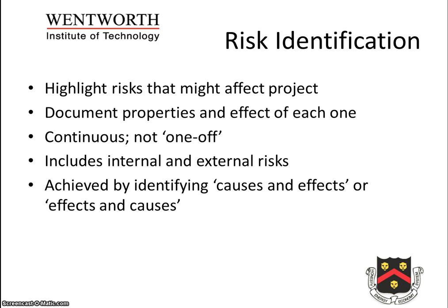Risk identification involves the identification and determination of the possible risks that are more likely to affect the project and properly documenting the properties and effect of each one. This process is not a once-in-a-project affair. It is meant to be carried out regularly as long as the project lasts.